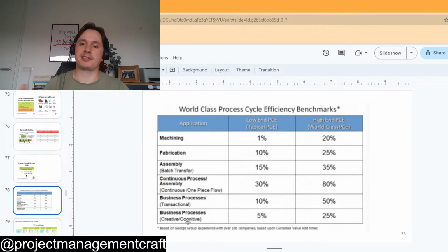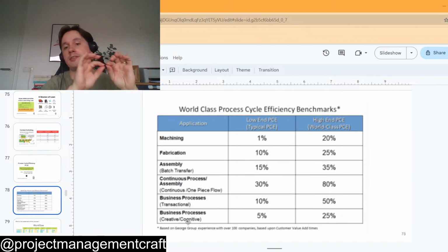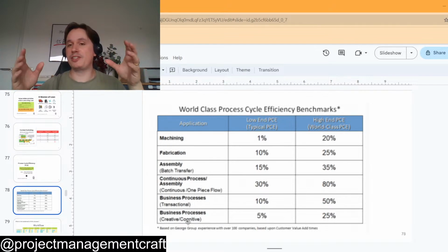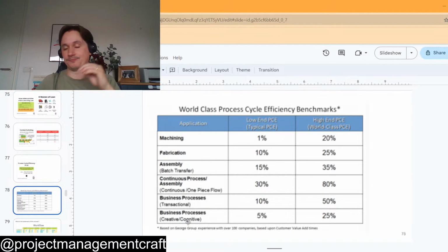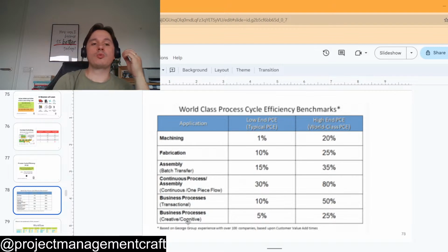The lead time for the supplier to deliver the components starts to count after you request the purchase order and after they receive it. There's always a gap there, a gap that you can try to close. If you can make the process more efficient and faster, you're reducing waste. If you reduce this waste, you're reducing the lead time for the suppliers to deliver, so you're reducing the lead time from start to finish, and you can deliver faster to your customer. So this is a very important, value-adding activity that you can do in a project.